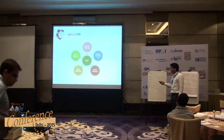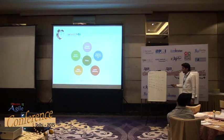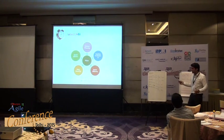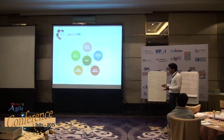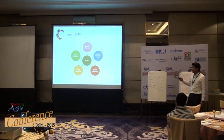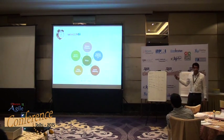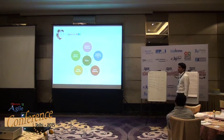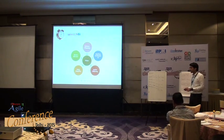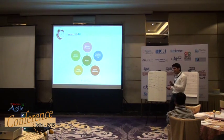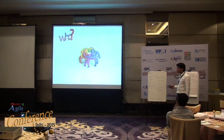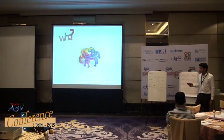Same thing happens in the daily standup — they go through their Kanban board, discuss any risks, and if there are any, they update that. In the sprint review, the product owner sees the stories, accepts them, and whatever risk is there is accepted. If there's residual risk, it gets added back to the product backlog. This is how we use our sprint meetings to identify risk. If you make it compulsory for the team to revisit stories from this perspective, the chances of identifying risks early in the cycle are greater. The ownership is with the product owner to ensure risks are being captured and mitigated.